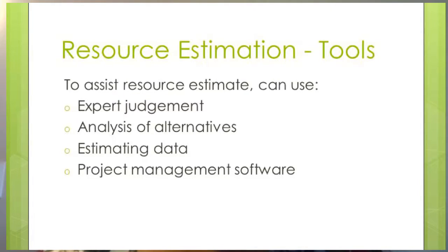I'm going to talk about estimating activity resources and what amount of effort goes into each activity by each individual that has been assigned to the activity. So to assist resource estimation, the following can be used: expert judgment, an analysis of alternatives, and estimating data in project management software. People helping determine resources needed must have experience and expertise in similar projects and with the